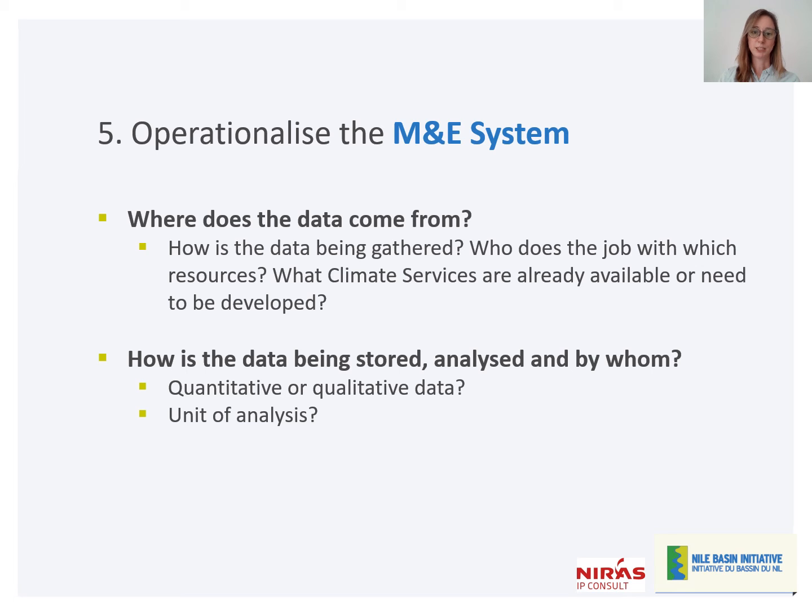Now, when operationalizing the monitoring and evaluation system, there are a lot of different aspects to consider here. One is, where does the data come from? Since monitoring can be seen as less urgent than other day-to-day tasks, it's useful to clearly assign monitoring and evaluation responsibilities to relevant staff and to make sure they have enough time for all the associated data entry, management, analysis, and interpretation.